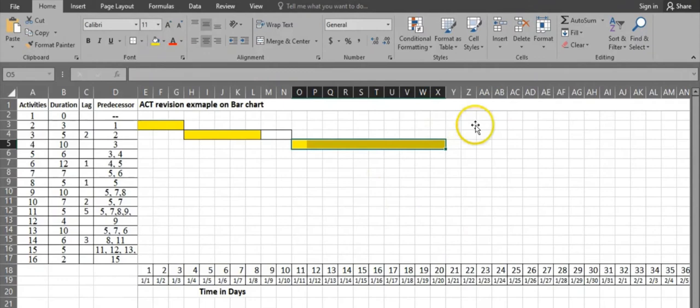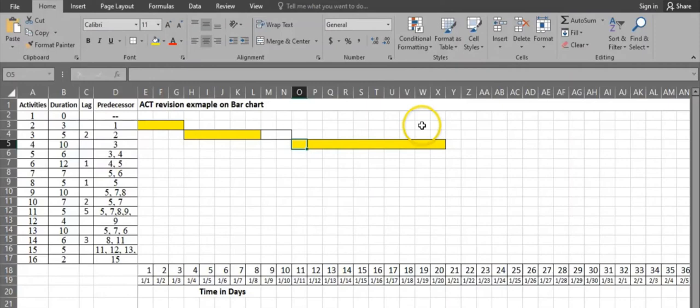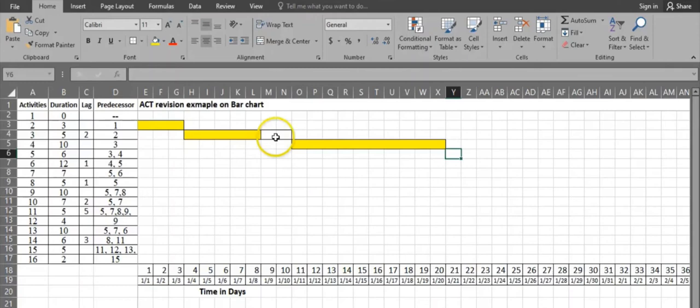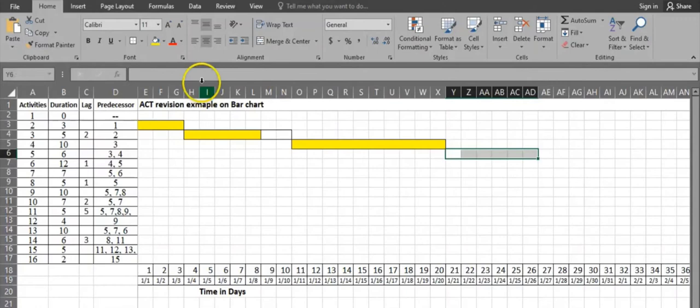Activity 5 has a duration of 6 days and two predecessors: activity 3 and activity 4. When there are multiple predecessors, we choose the one that finishes latest. Activity 4 finishes on day 20, which is later than activity 3 (day 10 plus lag). So activity 5 starts from day 21 and runs for 6 days: 1, 2, 3, 4, 5, 6.